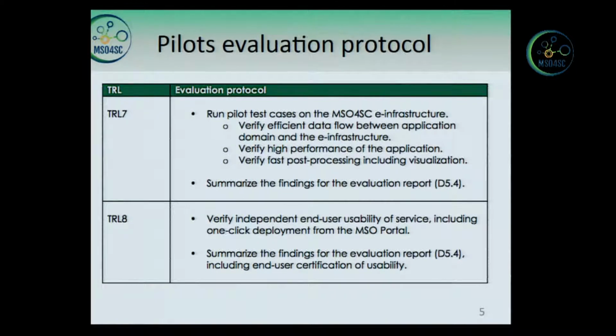And this is the protocol that we will follow, which is based on verifying the needs identified in work package 2. And we will do this in 2 steps. The first one verifying a TRL level of 7, and then a TRL level 8. And basically the difference is that on TRL level 8, the end user should be able to run these pilots on their own.